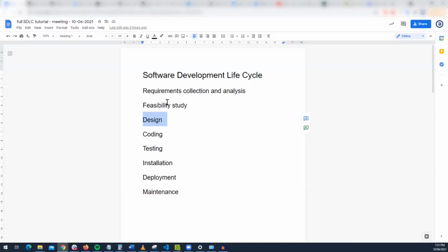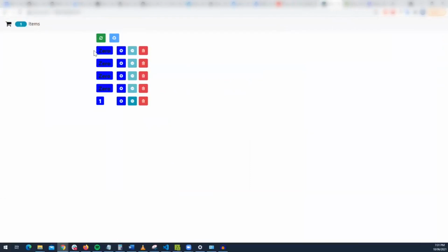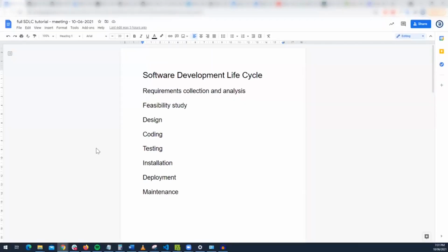So when you're scoping things out, you're going to figure out what the definition of completing this requirement is, right? So what does it need to pass? For example, in the running app, the metric to test this app would be that the buttons are functioning. You could count up to say 20, but in this case, it can count up to more than 20. And then the other metric would be that it has to be the color blue, right? So those are testable metrics because you can test them. Or once it meets a certain number, it changes the color, you know?